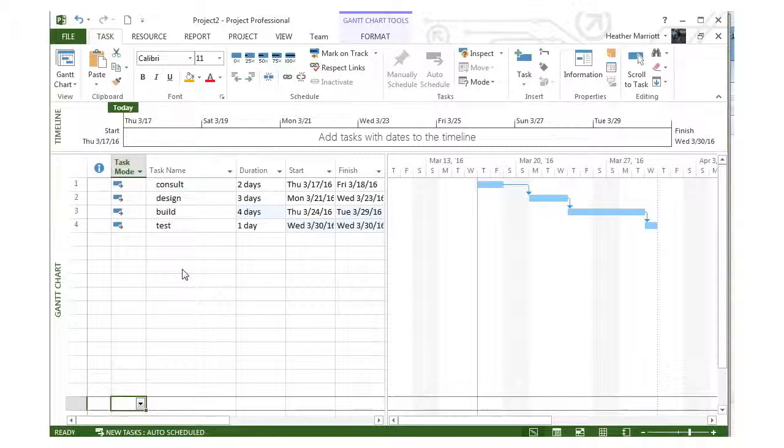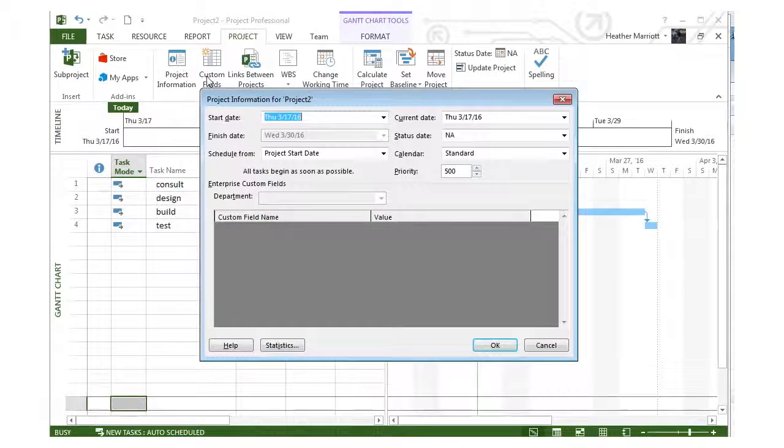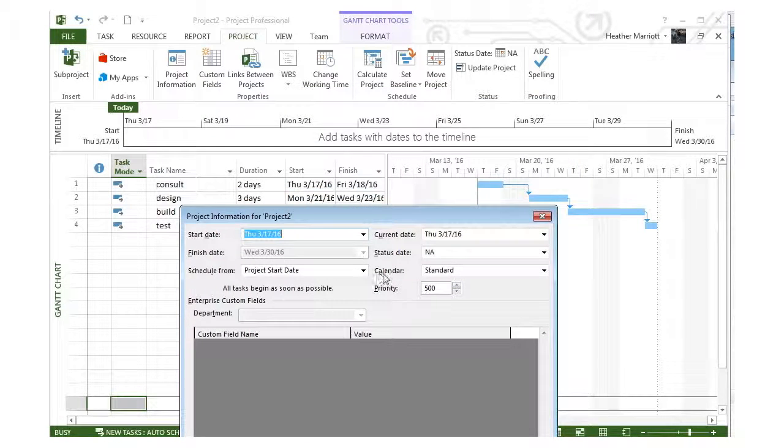We have a very simple Microsoft project, and I talked about the default calendar, and we mentioned that Saturday and Sunday are non-working days as a default, and we can see that they're grayed out here in the Gantt chart. If you're wondering about the details of that standard calendar and exactly what the working hours are, we can, for this project, look under project information, and we can see there's a calendar section, and there are some default choices.